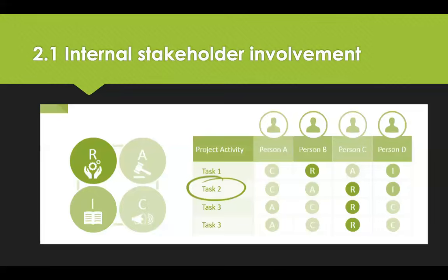Consulted are the people or stakeholders who need to give input before the work can be done and signed off. These people are in the loop and active participants, whereas the informed category just need to be updated on progress and decisions. They don't need to be formally consulted, nor do they contribute directly to the task or decision.